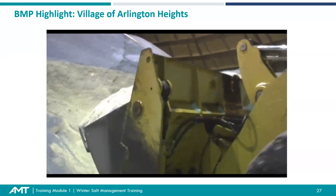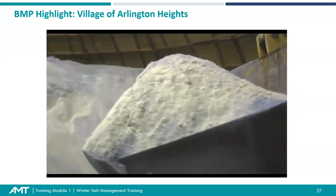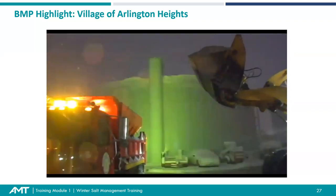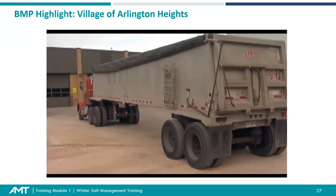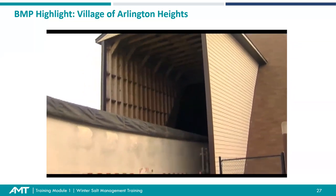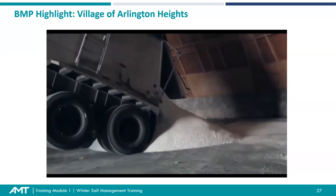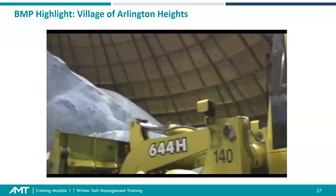Before every snow season, we determine how much salt we will need, and we purchase it through a competitive bidding process. There's a lot of complexity in buying and managing the commodity, and a lot of resource management that goes into this project. We make a purchase each year from the state, which does a sealed bid process for salt pricing. We also do our own bid contract to supplement the state, so we have two sources to turn to. Generally, with our own bid, we have the salt delivered before the season.